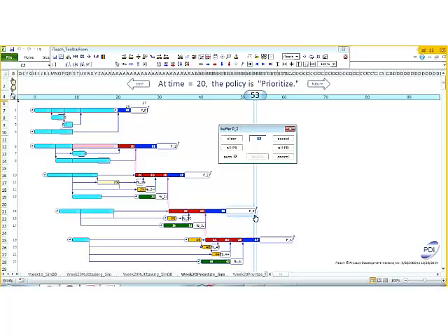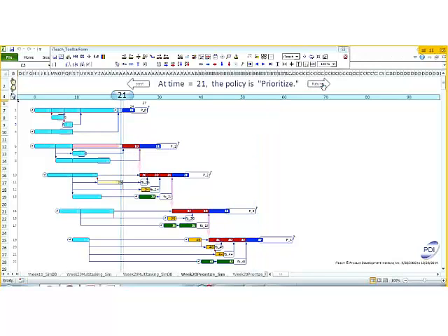Okay, so when we put a typically sized project buffer on here, you have a 90 to 95% probability of finishing the project on or before the commitment date. However, we do have this additional critical chain along here, and so I guess Steve is kind of trusting me that I've sized this project buffer to account for both the drum resource multi-project as well as the work in the project plan. So trust me. Okay, I didn't think you could make it either, so nobody believed you anyway.